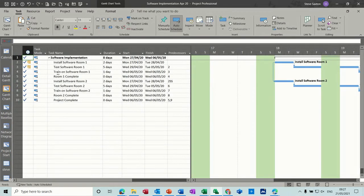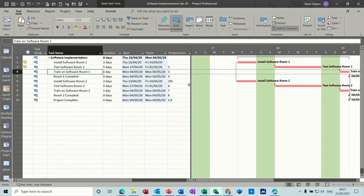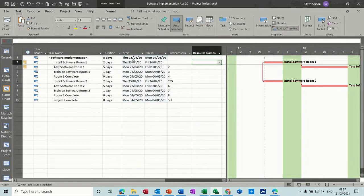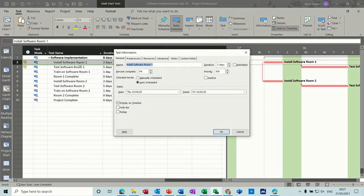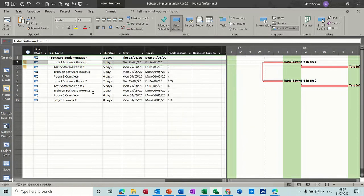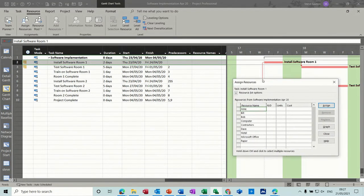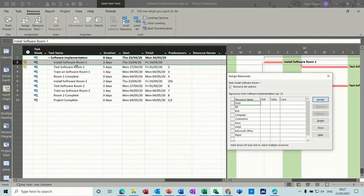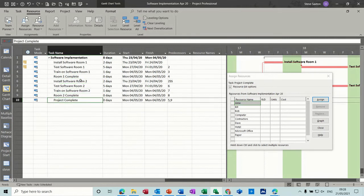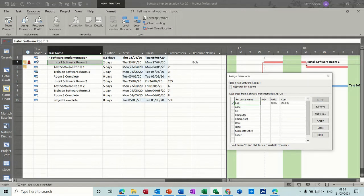Going into the Gantt chart, I'll mark these tasks as not complete for this example. You have the ability to add resources from the drop-down in the resource column, or double-click into the task and go to the Resource tab. The method I prefer is going to the Resource tab on the ribbon and using the Assign Resources box. I like this because it floats on the screen and updates as you click on different tasks — you just click the task you want. I'll assign Bob to one, but he's gone red.